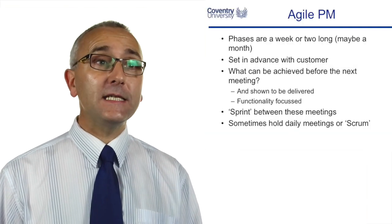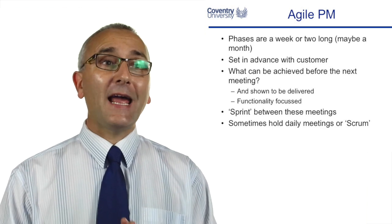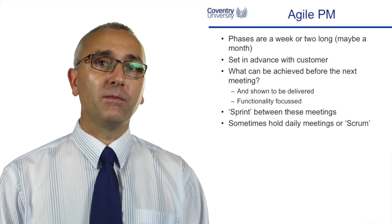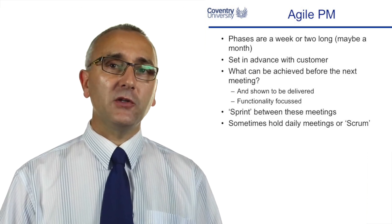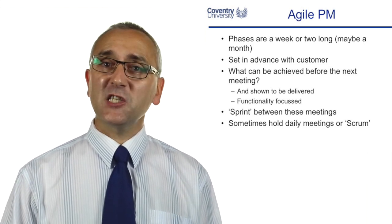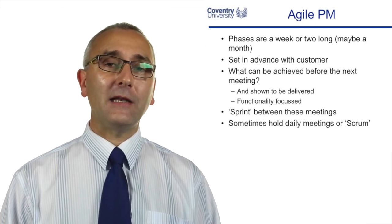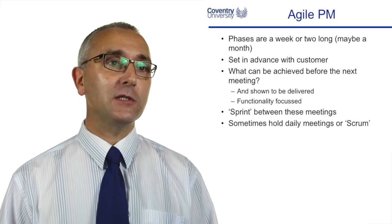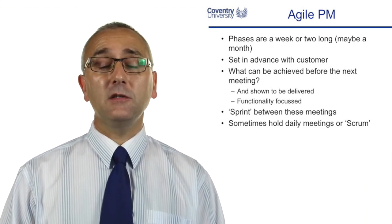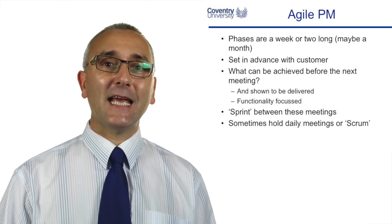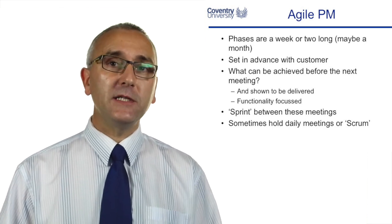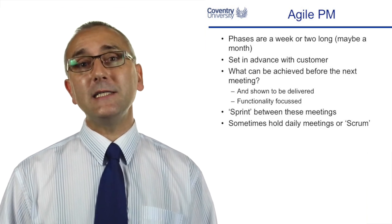In agile, the phases might be a week or two weeks long, and we have meetings with the customer to showcase what we've developed at regular periods. Instead of telling people exactly what to do, agile asks: what can you achieve before the next showcase meeting? The customer is coming back next Friday morning — what can you have done by then? What working software will be developed? It's shown at that Friday meeting, focused on the functionality the customer required, and we sprint between these meetings in a sustainable way.